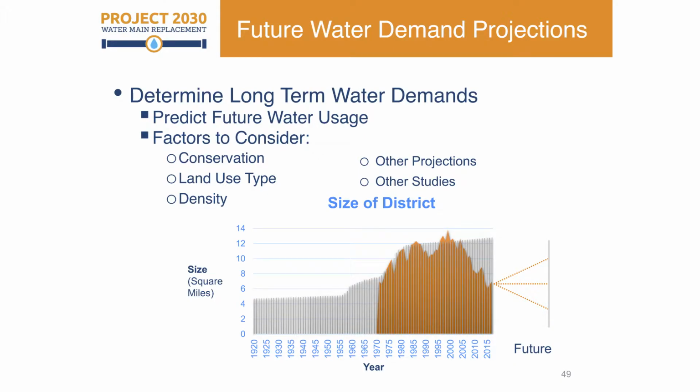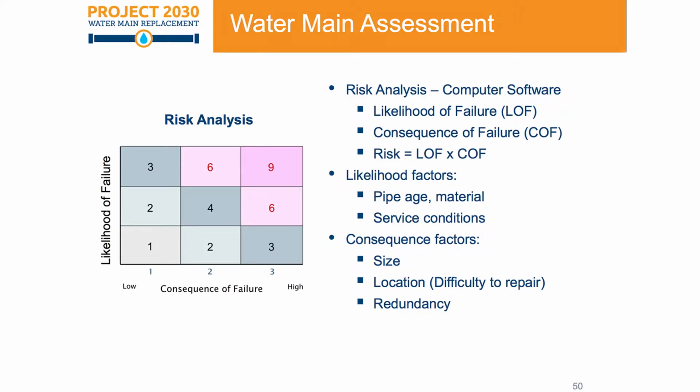Are we anticipating that water demand may go up? It could actually stay flat just through continued conservation by folks and increased technology, and there's been a real push here across the state for lowering both indoor and outdoor water use, so that could actually help drive that down. Or even the more extreme, and that would certainly be extreme, but if you were to just follow that projection down. So that's part of the work that we will be doing here, to look ahead to see what quantities of water we are talking about, and then when we're replacing pipelines, what size pipelines might that entail. So this is kind of shifting from demand forecast into the water main assessment.